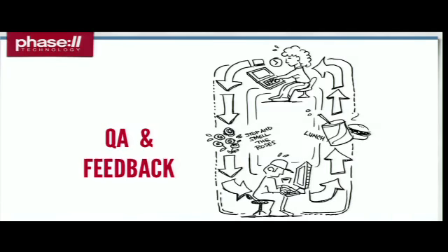You also have to look at a QA and feedback process. Make sure that you're still doing your fundamentals of development. Even though you've got a launch deadline that's a week away, don't compromise your QA and feedback process. Make sure that you have the right people reviewing things. Make sure that you get those final sign-offs. Make sure that you look at those success criteria you talked about earlier and that you've hit every single one of them. It's really important that you not compromise this. It's much better to move a site launch than to launch with a site that's not gone through the process of QA and validation that you've set up as a part of the project.